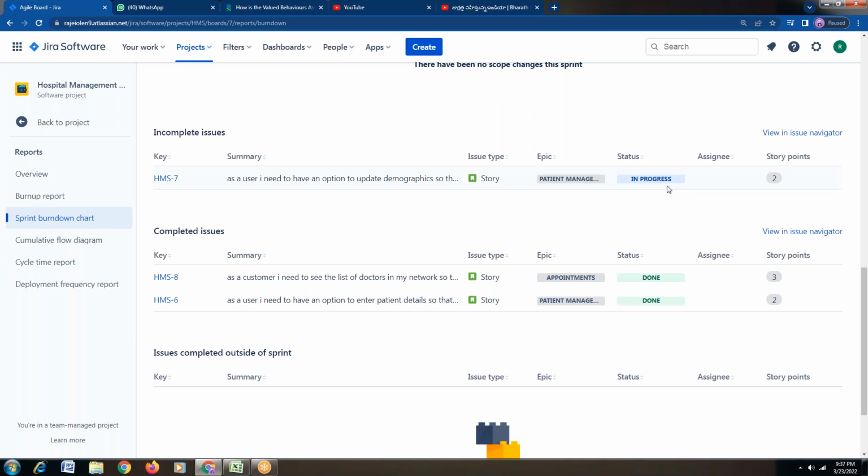Yeah. Understand? Right, this cumulative flow diagram, whatever you see here, we normally do in Kanban, not in Scrum, because all the reports are not done in Scrum. In Scrum, the major reports we prepare are, first, the sprint burn down chart to know how much work we have completed so far. Next, the velocity report, because velocity is also required: how much we have completed so far and what balance we have. Are they really capable enough to complete that velocity? Means, does our team have the capacity to complete it or not? Everything can be seen in the velocity.